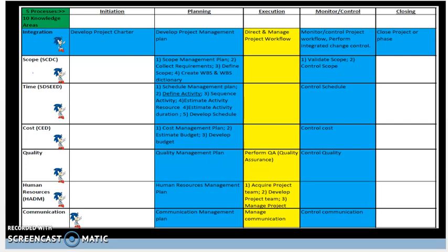After collecting requirements from relevant stakeholders and defining scope of the project, it is now time to divide the work into relevant buckets, also known as control accounts, where each bucket or control account has multiple planning packages and work packages under it. The purpose of this process is to provide a vision of what product, service, or result is to be delivered from the project. Ultimately, the WBS takes into consideration the scope statement and aims to decompose the scope into smaller manageable components called work packages and planning packages that roll up under relevant control accounts.